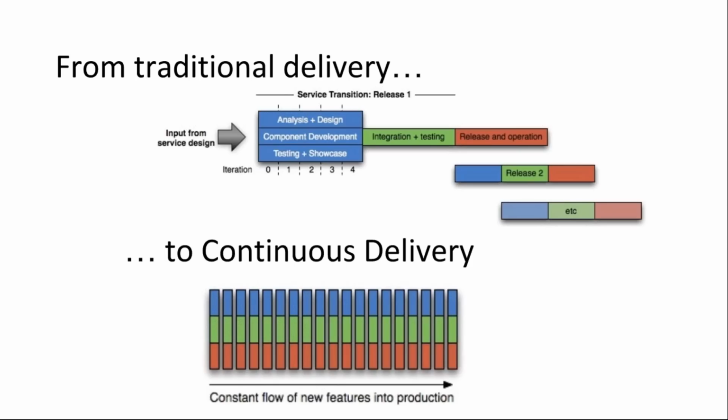And the concept of continuous delivery is to reduce the scale of every iteration to the point where it literally can be defined, built, tested, and deployed within days. Some companies are going as rapidly as multiple deliveries in a day, and that's for some companies, but obviously not many. But the principle is that by slicing the scope of the release into smaller and smaller iterations, we get some benefits directly.